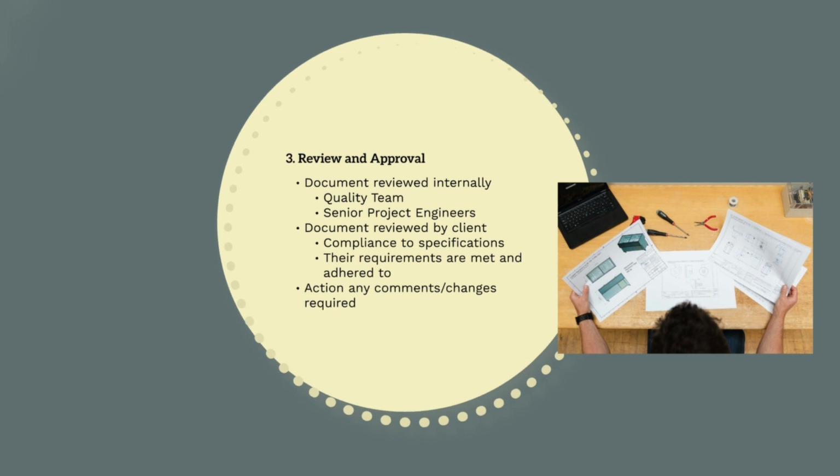They will complete a thorough review and likely make a number of comments we'll have to action or prove are not necessary. Any updates to the ITP will be submitted back to the client, and this back and forward will continue until all parties are happy with the ITP contents. Now we've got our approved inspection and test plan, and we can begin works.